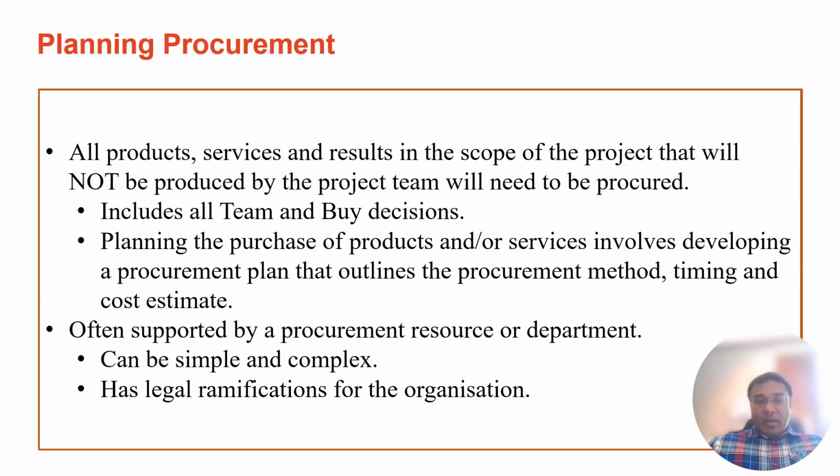So a lot of times the statement of work is a crucial thing. A lot of times we do not know what we need to procure, so we got to be very careful in defining the statement of work. And the fifth part is about developing the procurement management plan that defines how procurement will be managed throughout the project. Probably the next slide we'll discuss more on that. So the output will be your procurement management plan, your procurement strategy, your bid documents, your source selection criteria, and pretty much your make or buy decision.